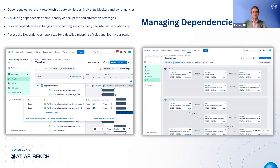Dependencies in JIRA Plans highlight how different pieces of work connect and influence each other — showing you where one issue might block another or where certain tasks rely on others being completed first. By fully mapping out these relationships, project and program managers can find the critical path: those tasks that must be done in sequence to meet key deadlines, and plan contingencies if something goes off track. You have the flexibility to display dependencies either as simple badges on each issue or as connecting lines that visually link tasks. Beyond the main timeline, the dependencies report tab offers an in-depth look at how issues are related, making it easier to prioritize work and adjust plans as needed.